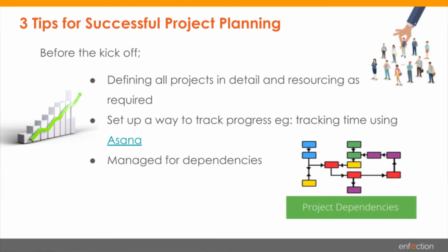We need to understand these dependencies, because, for example, if Abhi gives dialogue artworks to Eddie, and Eddie is not here, in his absence we need to understand how we will get the work done. So we need to have a backup plan. That is always very important to keep in mind. We need to come up with a backup plan at the planning stage, because in the execution stage, if we cannot replace him, the impact on the project at the end is something we cannot recover, in the deliverable and the quality. So we need to keep that in mind.